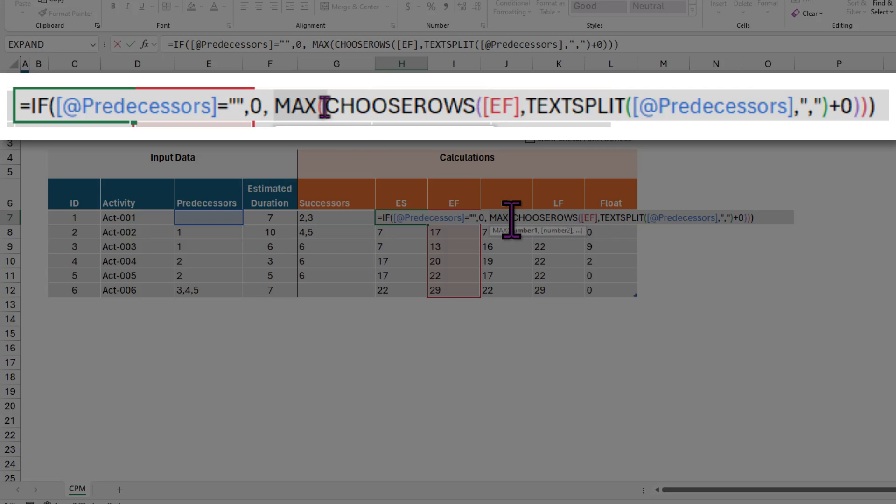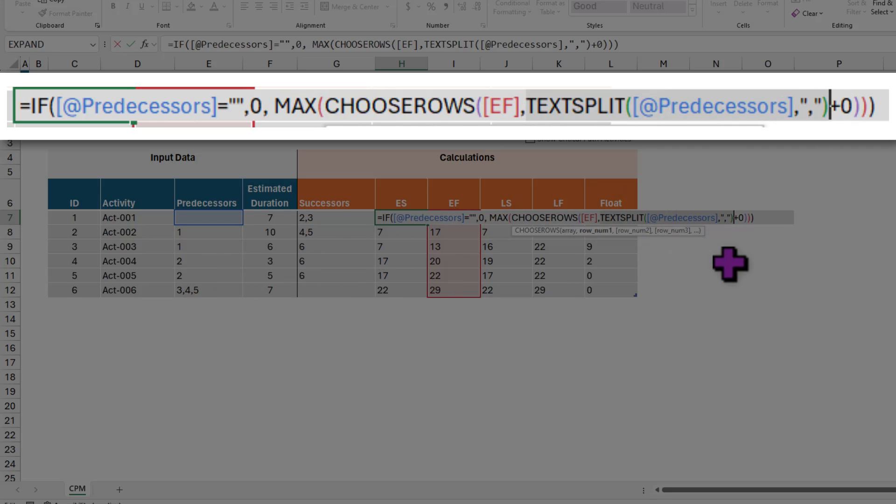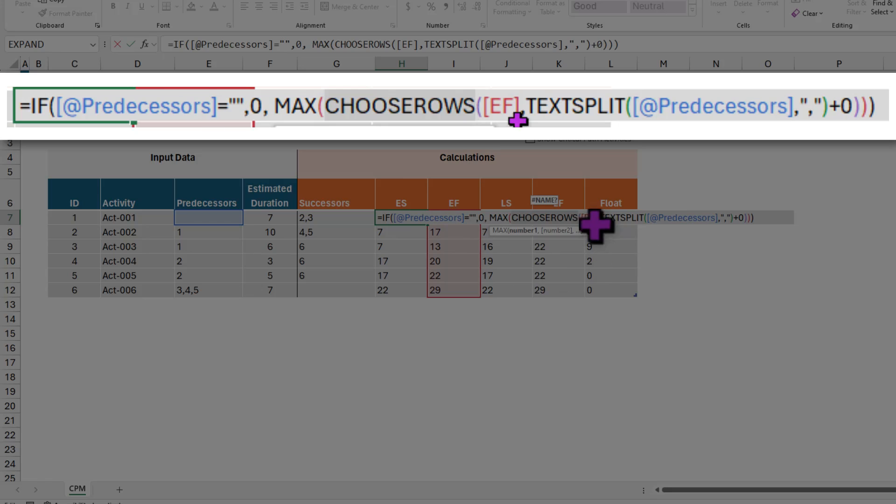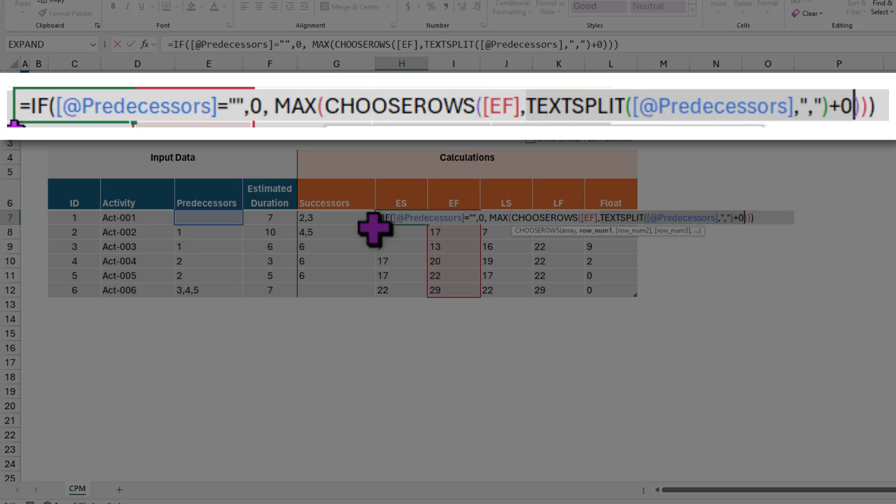So to get the maximum, I'm using a complex formula here. Let me go inside out. So we look at the predecessor column and then do text split on it with comma separator. The text split will return the values in text format, so I'm adding a plus zero to that to convert that into number format. And then I'm choosing EF column, the earliest finish column. So choose rows of EF. This is how I can get all the predecessors' finish times. And then using max formula, I'll find out what is that maximum value. When is the latest all of my predecessors have finished their job. Then we'll put that value as ES.